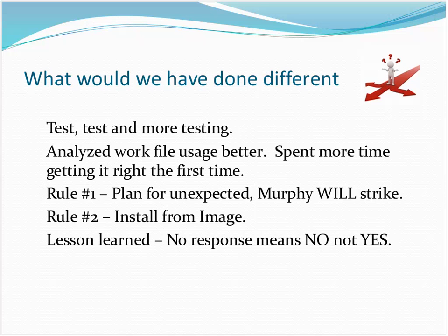That was my entire X problems, where I put different versions on unknowingly. And the lesson I learned: if you send a big email to a user and say, tell me if you've got a problem, and you don't hear something, that doesn't mean there isn't a problem. If you don't get a response, that doesn't mean yes. That means I didn't understand it and deleted it. So that was my big boo-boo.